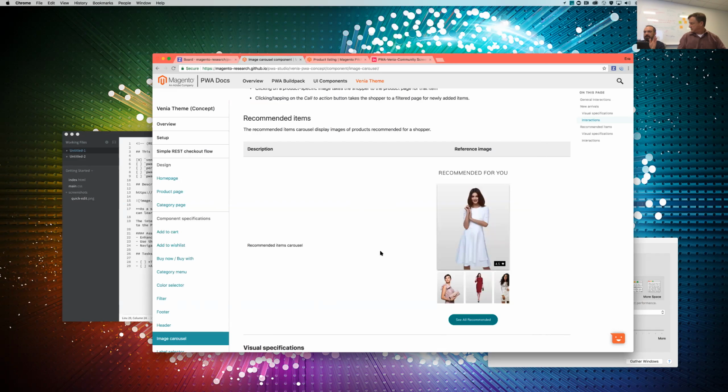I'm going to call the ball here and say that cover flow should be a stretch, because if I'm an implementer, I first of all care about the underlying data and the state of scrolling around and having them be visible or not visible, and, this is key, progressively loading if it's a large list. Let's say you got 10 of them, but only 3 are visible. For a PWA, you definitely want the logic that makes sure all 10 don't render and all 10 images don't download if you're never going to see them. All of this is more crucial to MVP than the specific visual treatment, because we're going to pick from one of these and all of them are good.